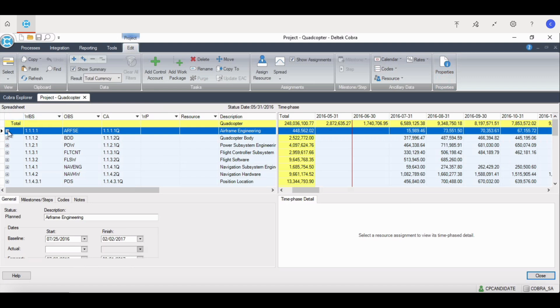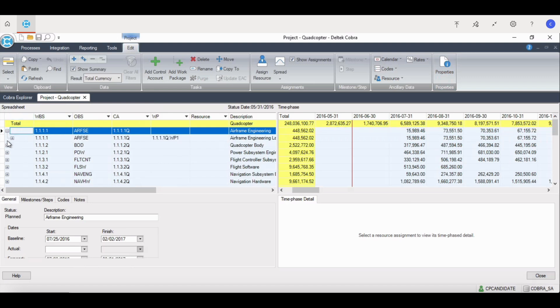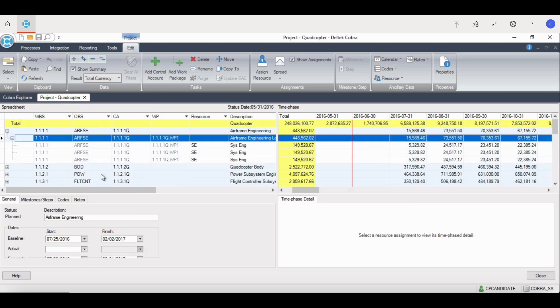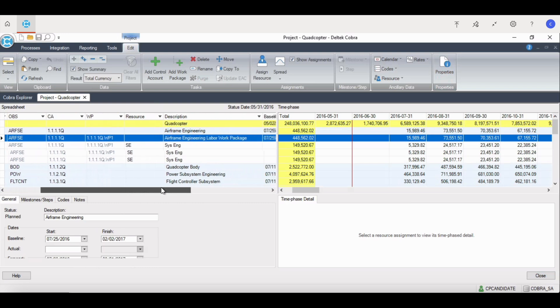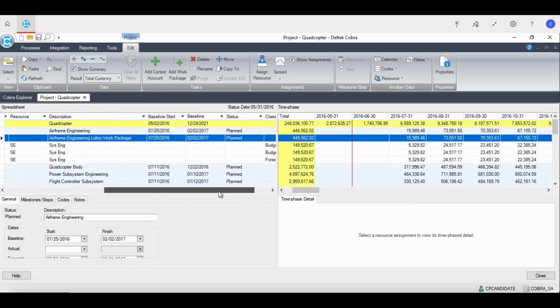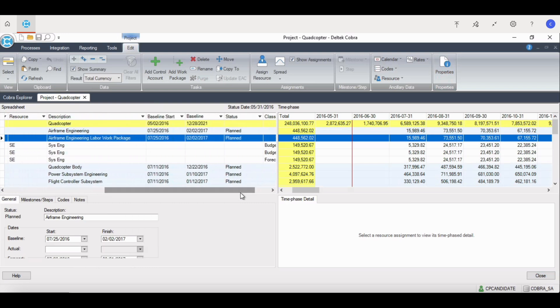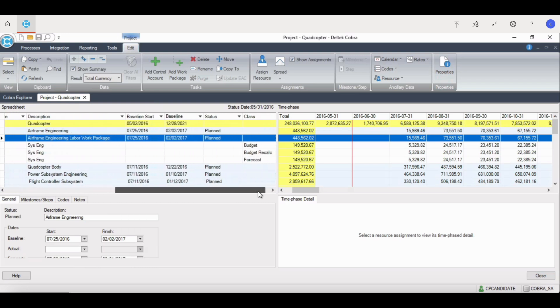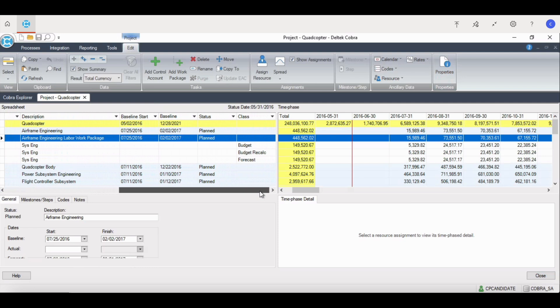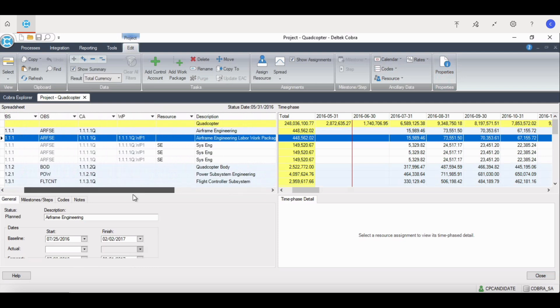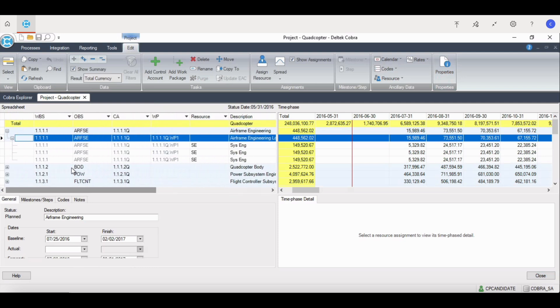If you click on the pluses, and then click on the plus again, this breaks it down to your lower level. So we start at the control account, which is a concatenation of your control account fields 1, 2, and 3. And for this project, it's WBS, OBS, and control account. And then down to the work package level, and then one more level down to the resource, which is the lowest level.